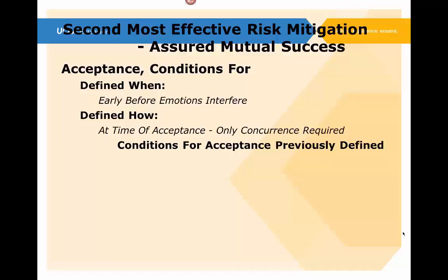One of the things I learned many years ago was that in the beginning, when a project starts, everybody's on good terms, good relations, and there isn't any hostility or emotion or friction at all. And so, a big risk mitigation device for me, an automatic built-in, is that up front, I want to get acceptance defined between the customer and myself as the project manager, or between the customer and the project.